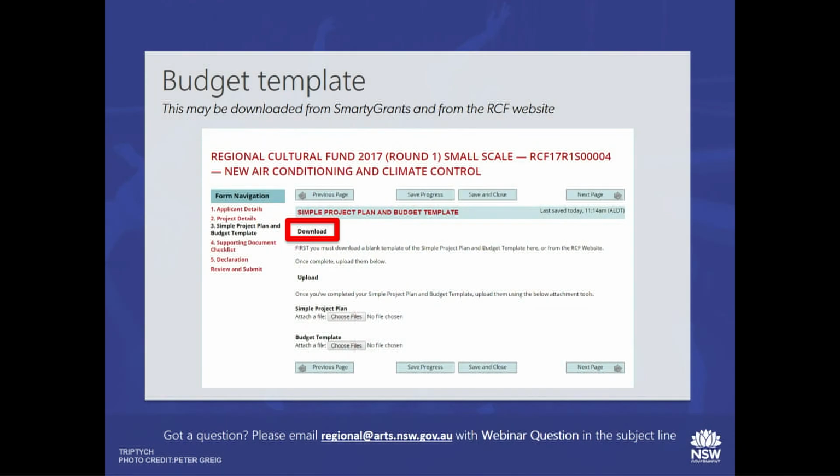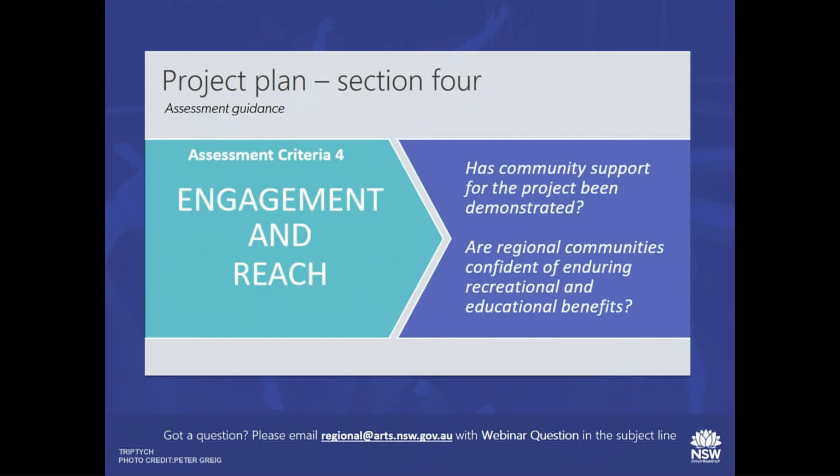Anything else like the maintenance that might come around of it, the staff that fill it, exhibition costs, all that other stuff that's not part of your project for the purpose of the fund must go in the ongoing costs. We'll be providing further detail about the budget going forward, but that's a key point that people kept asking about throughout the EOI stage: where's the line between your project and it going forward.